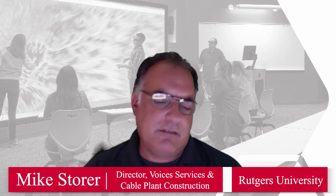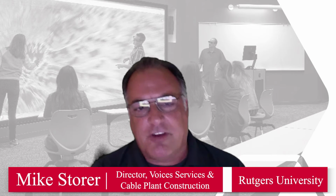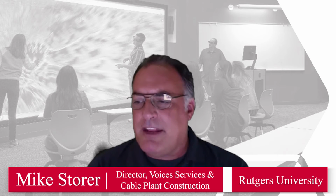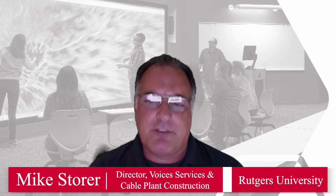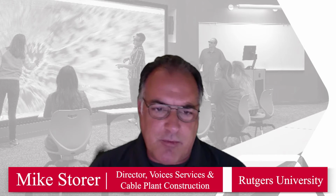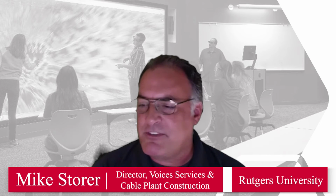So at Rutgers, we assign a dedicated project manager and construction manager to all major new construction and renovation projects, and they stay with the construction team from facilities throughout the project. It gives us an opportunity to manage the subcontractor, whether it's a vendor that we bring in or a vendor the developer would bring in. We assist them with understanding and implementing the cable plant the way that we like it, giving us back the as-built the way it'll go into our cable management system.